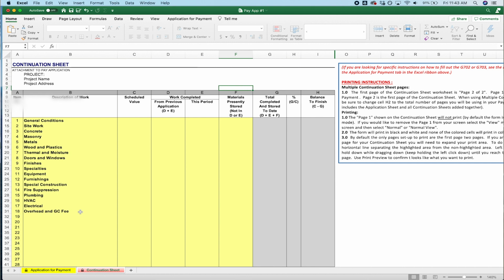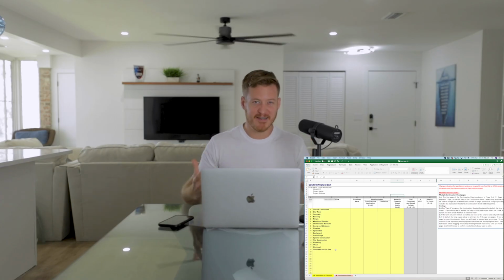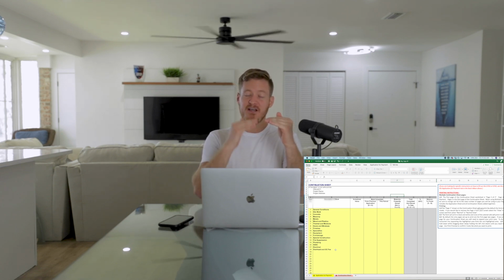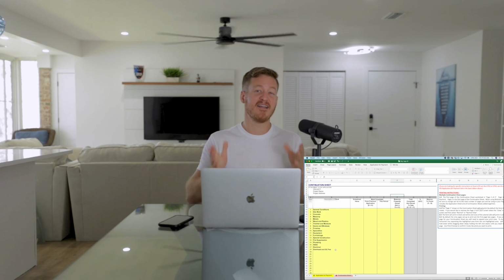Number 1, we have our general conditions, and then we have site work, concrete, masonry, metals, wood and plastics, thermal and moisture, doors and windows, finishes, specialties, equipment, furnishings, special construction, fire suppression, plumbing, HVAC, and electrical. And then you want to, most importantly, include your overhead and your general contractor's fee. Okay, so that can be a separate line. You can break it down. You can do overhead, you can do GC fee in 2 different lines. It is up to you.